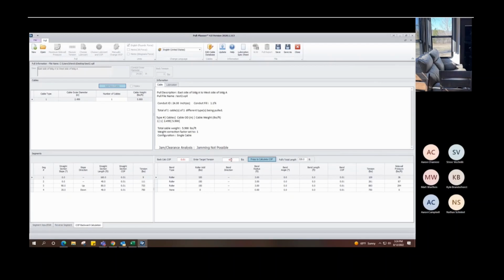What you could start doing, and it might be helpful to you in planning future pulls too, is this: I worked with a big contractor, and they actually do this for all of their pulls. They save the measurements from the field, and they have a report. That report reflects the real field coefficient that they got with all of their pulls. Where this came in really handy is that they had been doing several similar projects in the past, recorded all of their field information, and then when they went to a new project, the owner of the project told them, you're going to use a 0.33 coefficient of friction.